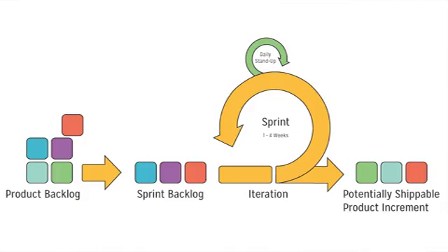At the end of each sprint, the client is delivered a working prototype. Each sprint contains the 4 Scrum events I mentioned earlier. Sprint planning occurs at the beginning of the current sprint to determine what will be completed in that sprint. The daily Scrum is a meeting that occurs, you guessed it, daily. It normally takes place at the beginning of each day so that the developers can talk about what tasks they will be doing and what they need to accomplish these tasks. The sprint review and retrospectives take place at the end of the sprint.